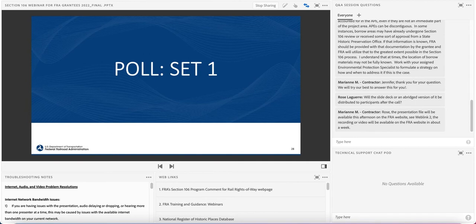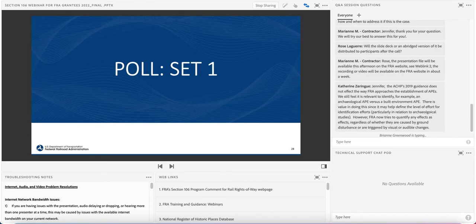So the general National Register criteria is that a historic property is at least 50 years old unless it's exceptionally significant. But the difference that I explained was that FRA uses 45 years just because our projects can take a bit of time to actually construct through the grant process. So the standard is 50, but FRA uses 45 years in age like a lot of federal agencies do.